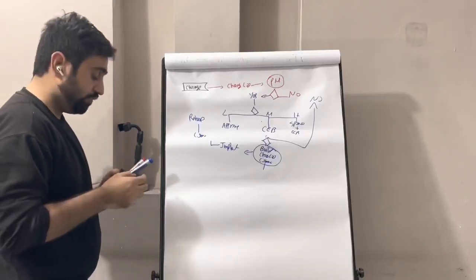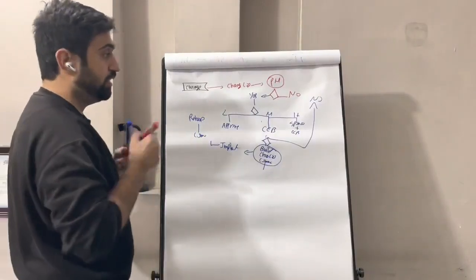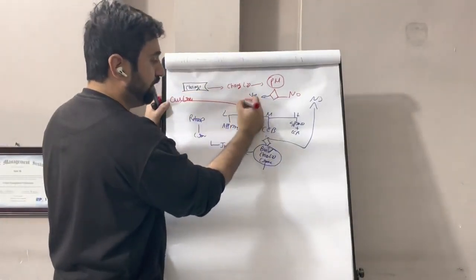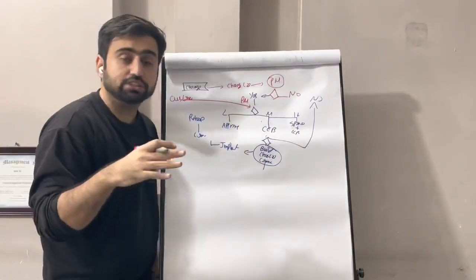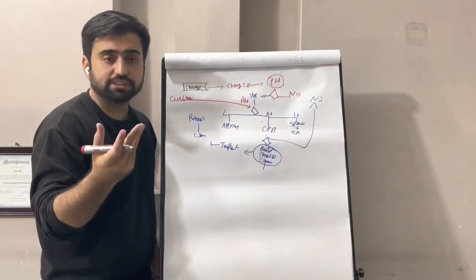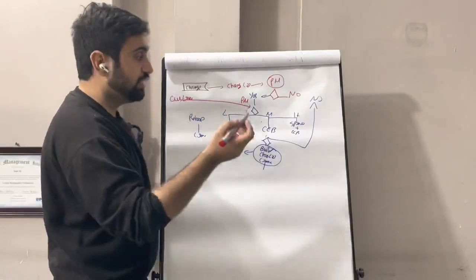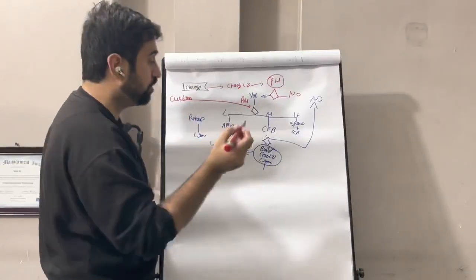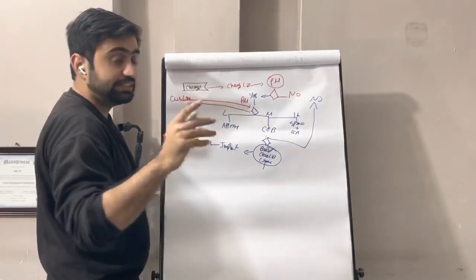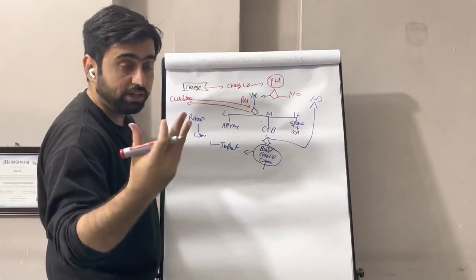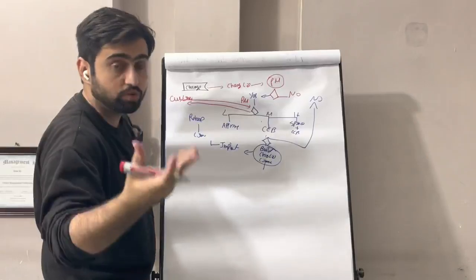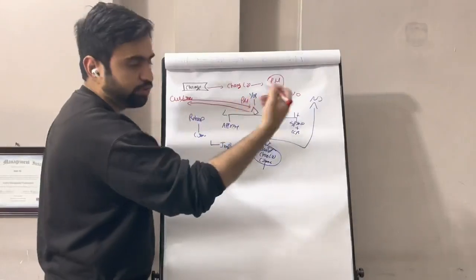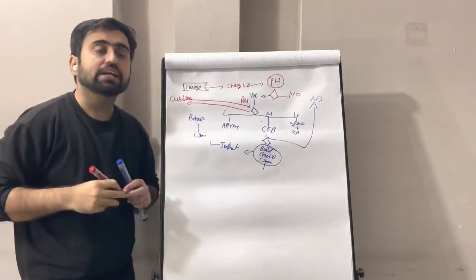So this was a change requested by anyone other than the customer. If the customer requests the change, it comes directly to the PM. It does not check whether this change affects the deliverables or not. The PM directly does the detailed analysis, and if that change is affecting scope or actual cost, he tells the customer, hey customer, this change is affecting. Do you want me to move ahead and go to the change control board? It is going to cost you more and take this much more time. If the customer says yes, go ahead, then the same process follows. So this is how change happens in a predictive environment.